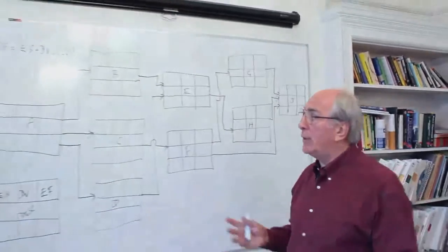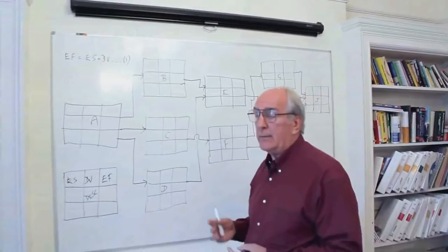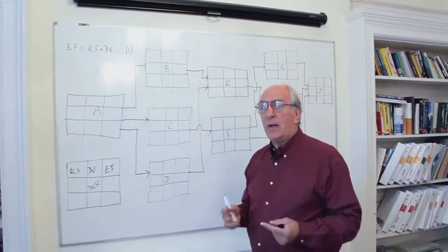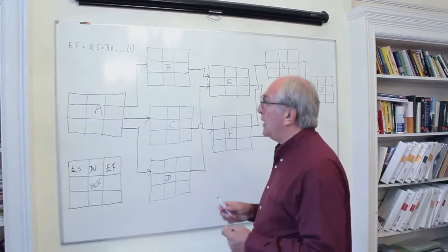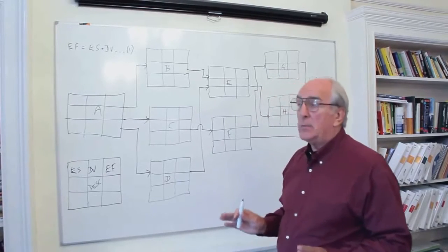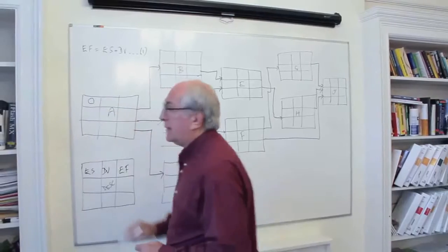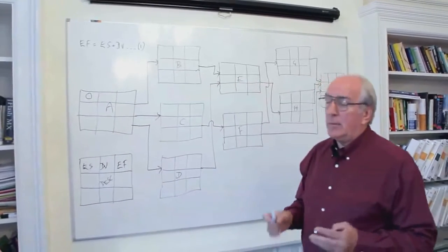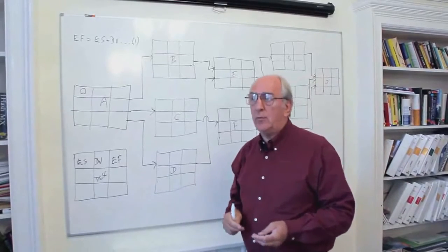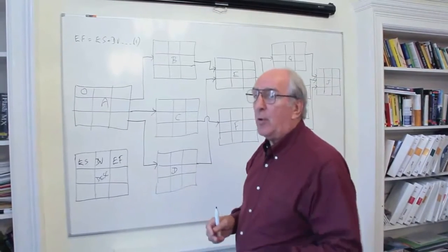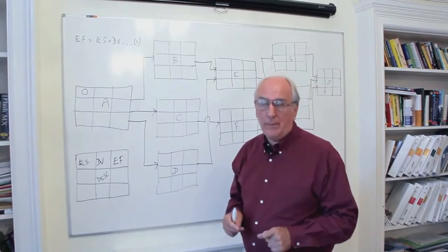And we're going to use a critical path analysis eventually. That's going to tell us the fastest or quickest time we can do this job, this complex project. I'm going to make the assumption that we start at a time called 0. You may say, what is time 0? I'm going to say it's a special case before any of the time running on this job has run. It's just before we start time period 1.